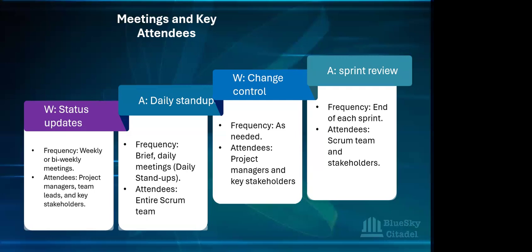Can you imagine, with Waterfall, you're working 3, 6, 9 months on the project, and then at the end is when you're going to get the feedback from the stakeholder, and they could tell you all this work you've done is no longer in scope or is no longer relevant. Whereas you can get this feedback every 2 weeks within your sprint from your stakeholders with your sprint review. This is what I really love about Agile and Scrum, that you can get those changes and that feedback there straight away and make that change.